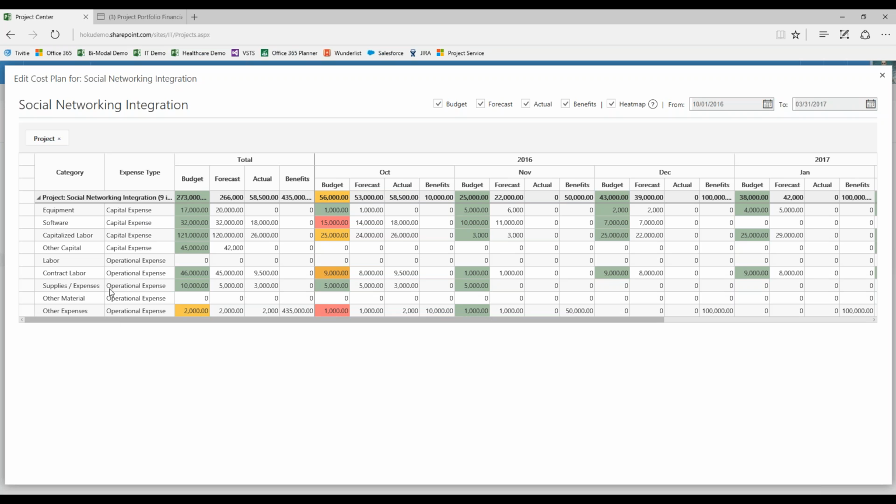And notice from a cost type perspective, not a cost category, but a cost type perspective, we could track budget, actuals, revised forecasts, and even track prospective or actual benefits that we're getting across these different cost categories as we go on through. What's nice about this is you can define as many different cost types, as we call them, along the way. We can do these things on a period basis to get the view or the horizon that we'd like to have. And then we can very easily change the way we look at this.